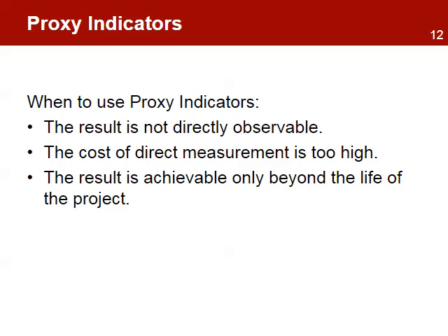Generally, proxy indicators may be used for the following situations. The result is not directly observable, the cost of direct measurement is too high, and the result is achievable only beyond the life of the project.